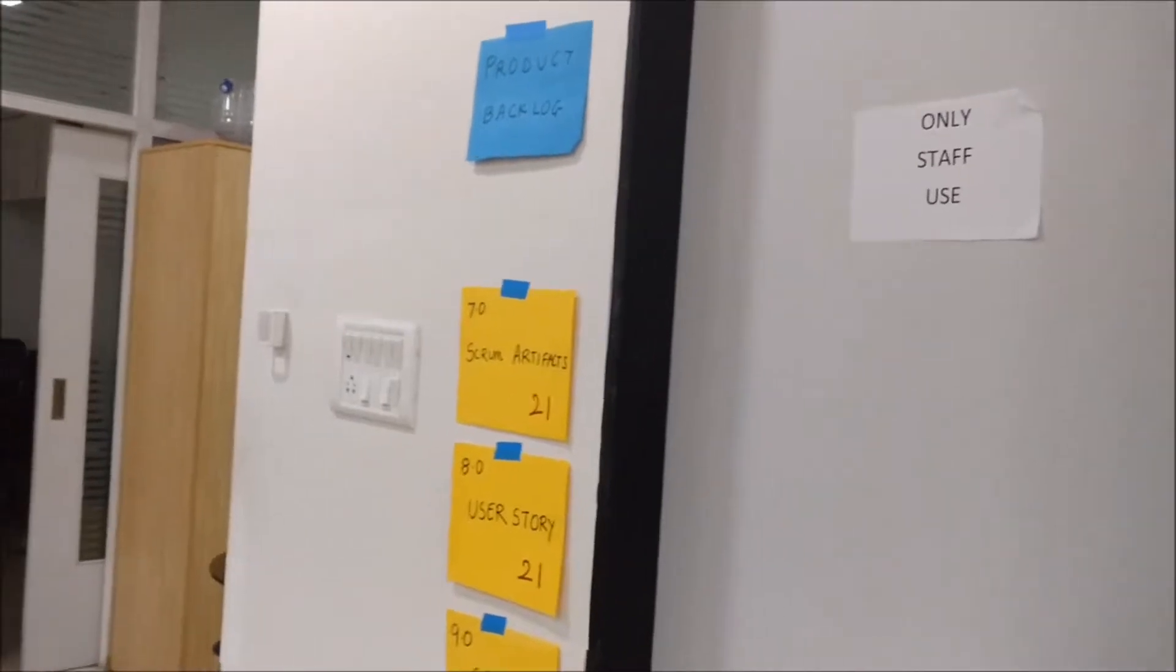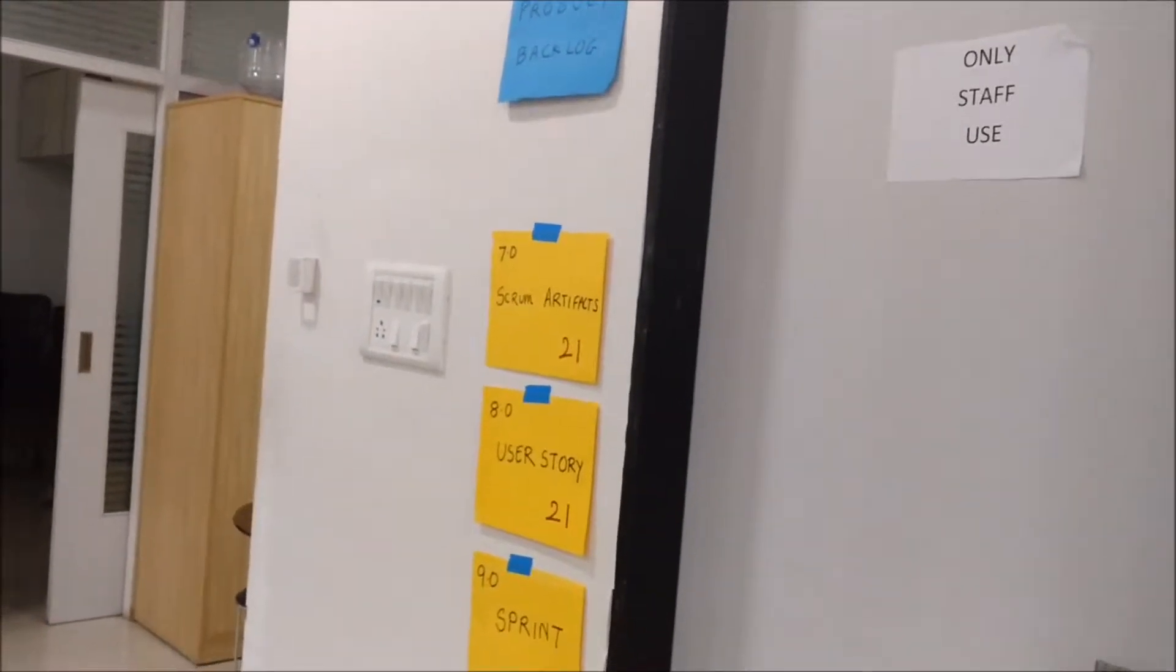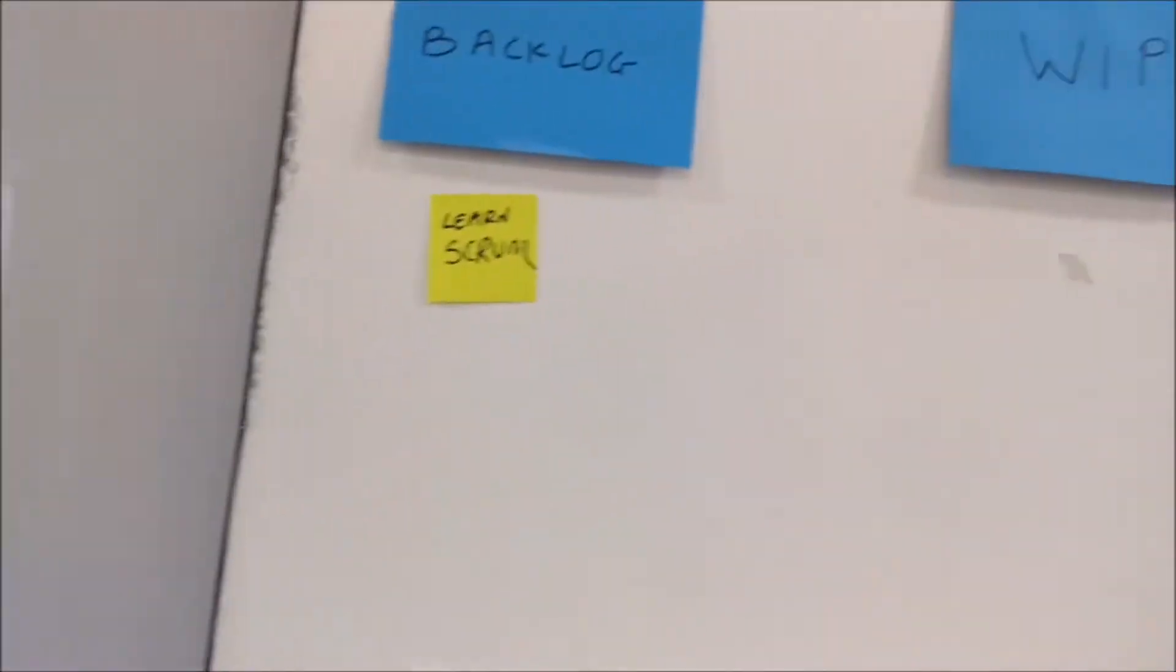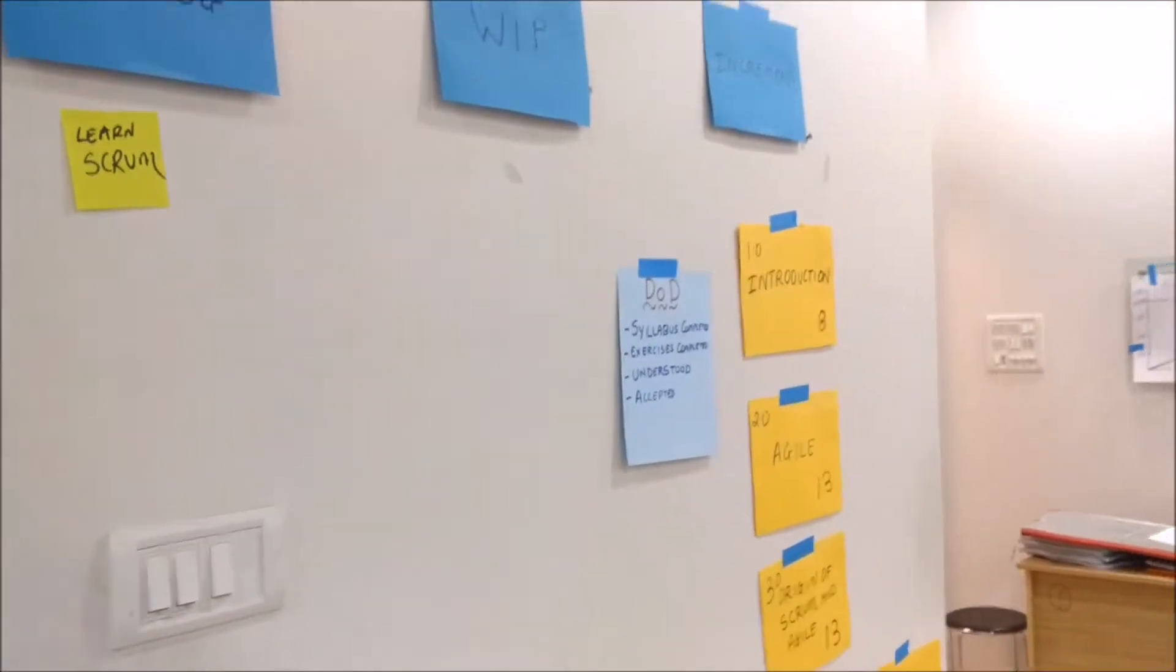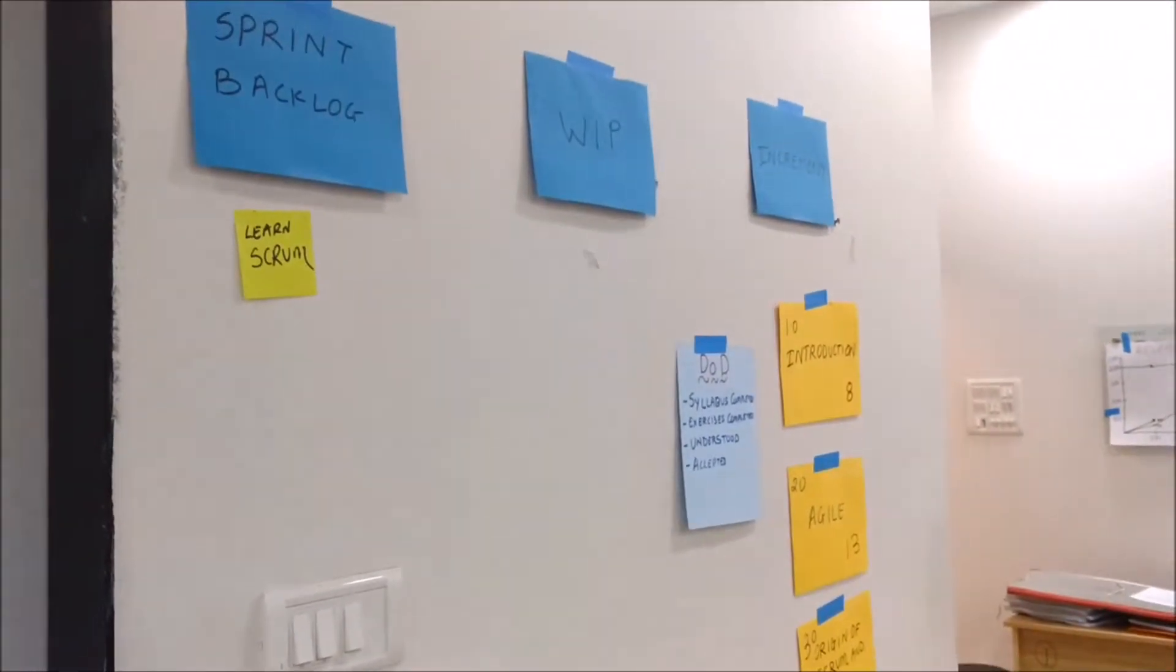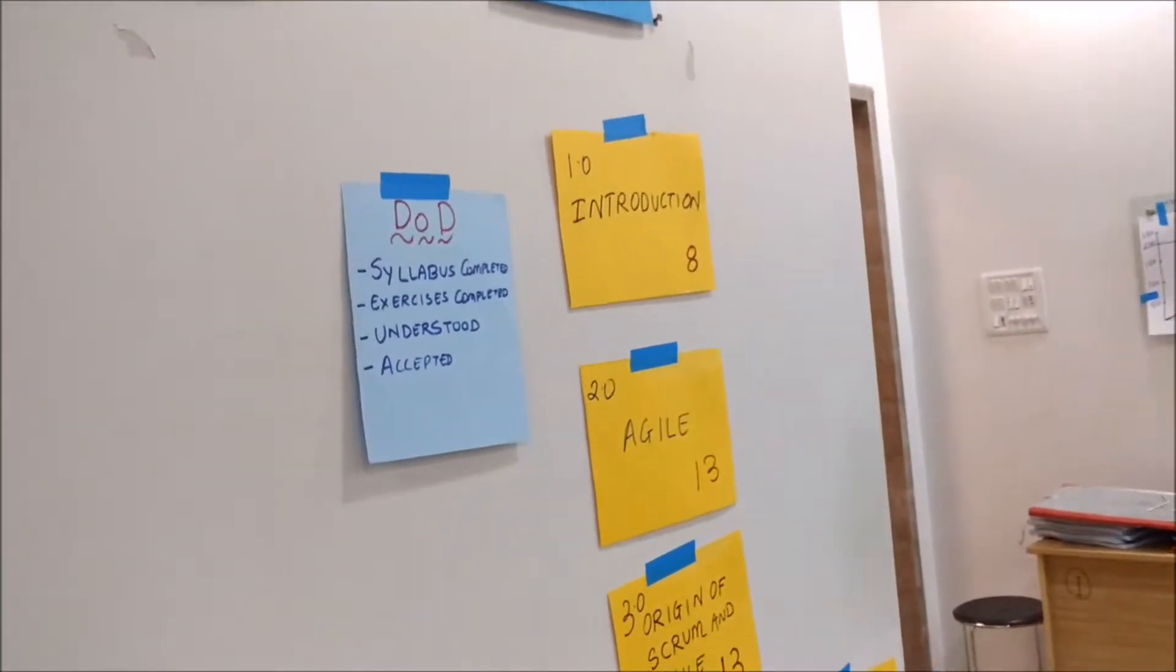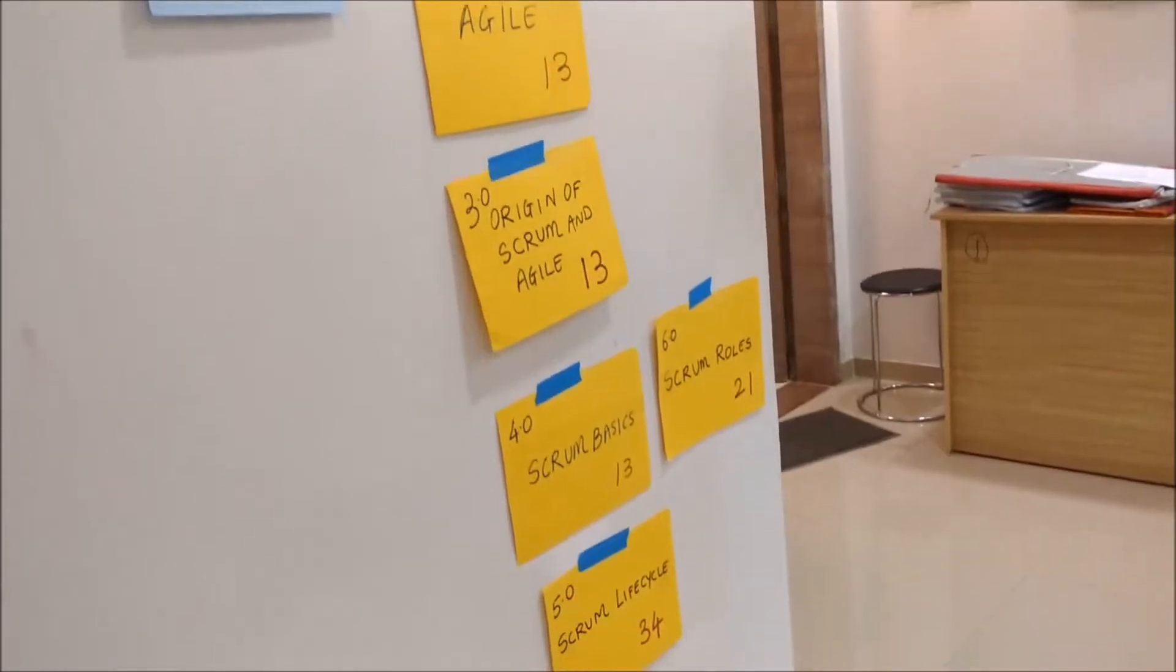On day one, I have simulated this product backlog on the wall with different product backlog items here. Then the sprint backlog is represented here on the wall with different items that we had taken in for work in progress, and then the increment that we have created at the end of day one.